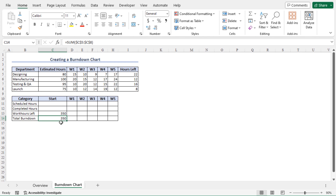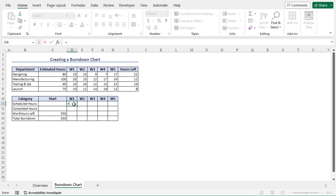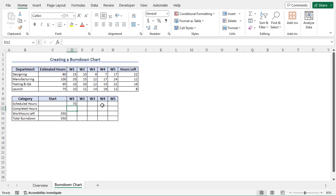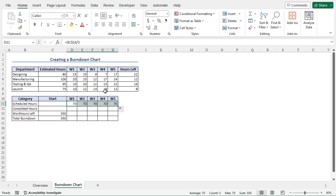The total burndown amount will be divided into 5 equal parts — that will be the scheduled hours of the 5 weeks. To calculate the scheduled hours for week 1, go to cell D11, type equal, select the total burndown amount (cell C14), press F4 to lock the cell reference, and divide by 5. Hit Enter to get the scheduled hours of week 1, which returns 70. This means the summation of all departments' work hours in the first week should be at least 70. Using autofill, the scheduled hours for all weeks are the same: 70 hours.